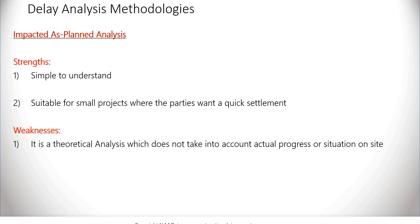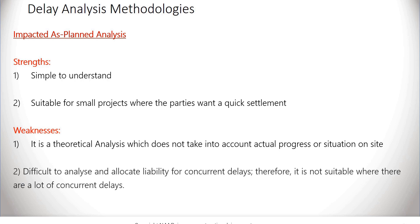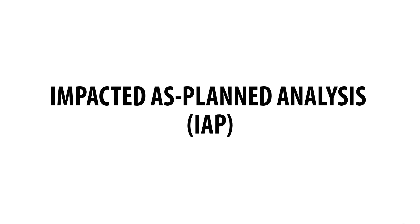Therefore, it is not suitable when there are a lot of concurrent delays. Now, let's carry out an impacted as-planned analysis in MS Project.